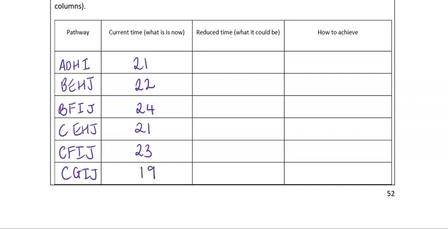So remember, moving forward, the longest pathway from start to finish is your critical path. So at the moment, our critical path and our minimum completion time is 24 hours. So now we want to do some reductions. So the first step is do everything that's available to us. So we're allowed to reduce B by 2, we're allowed to reduce C by 3, and G by 1. So instead of applying these individually, I'm going to apply all of them.